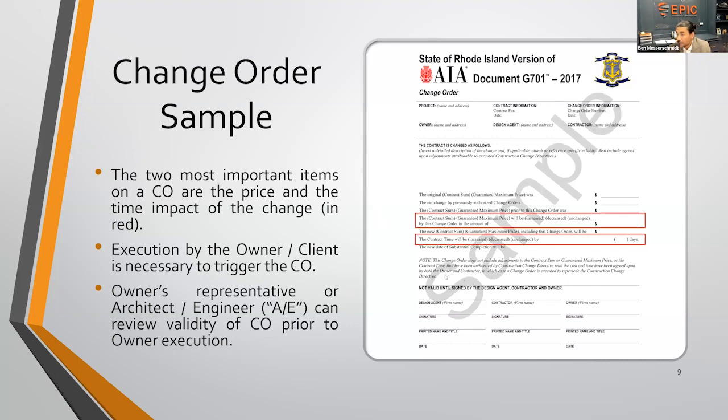Now, first, the process will go something like this. It's going to be submitted as a change order to the engineer or architect for their review to confirm whether or not this would be a valid change order. Valid meaning that this would be in excess of what's shown on the plans, as well as in excess of what's documented in the contractor's contract with the association.